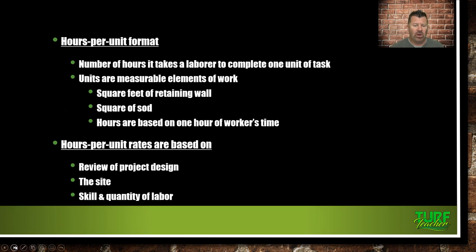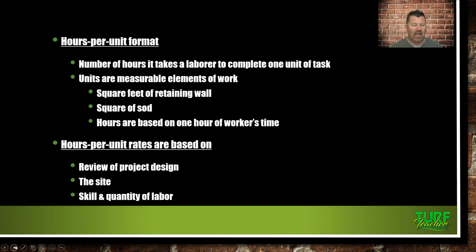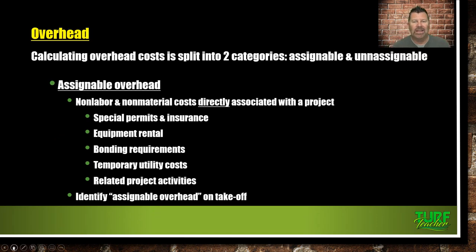Hours per unit is the number of hours it takes labor to complete a task. Units are measurable elements of work — square feet of retaining wall, a square of sod. Hours per unit depend on review of the project design, the site, and the skill and quality of labor. Quality of labor is hard to maintain right now. Overhead is split into two categories: assignable — non-labor, non-material cost directly associated with a project such as special permits, insurance, equipment rental, bonding, and temporary utilities — and unassignable overhead.